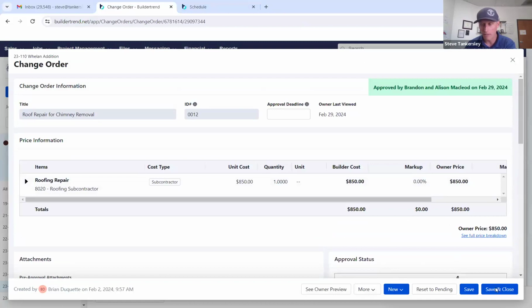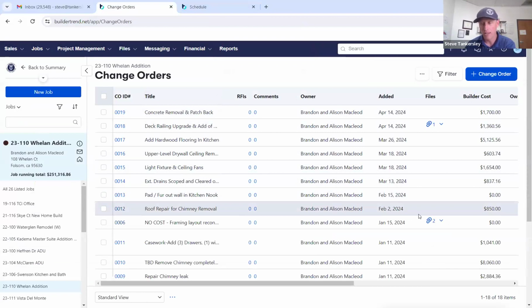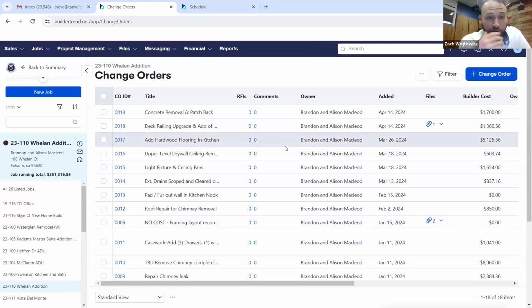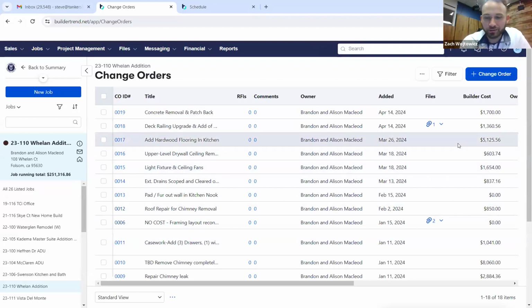But everything really needs to be signed, right? So we use this, it actually links to our budget. When we do a roof repair, let's say we assign it to the roofing cost code, and our budget updates accordingly once it's approved. And this is one that I've seen personally save people. You talked about risk earlier, nothing is worse than a disagreement about what you said you were going to do with no documentation. It avoids any miscommunication, but it also flows seamlessly into your budget and other areas that affect the financials, so you're not missing dollars.